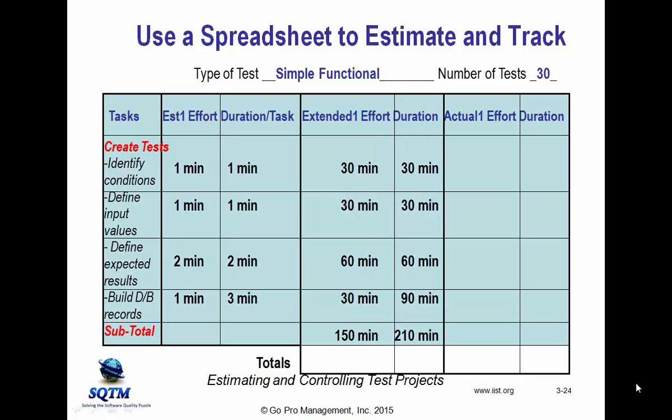We're coming up with a much more reliable basis for our estimate. So when somebody says, well, gee, you don't have 210 minutes to do this, do it in 60 minutes, you can say, well, which of these tasks don't you want done? Or which of these tests that we need to demonstrate to be confident it works, which of those are you going to do without?